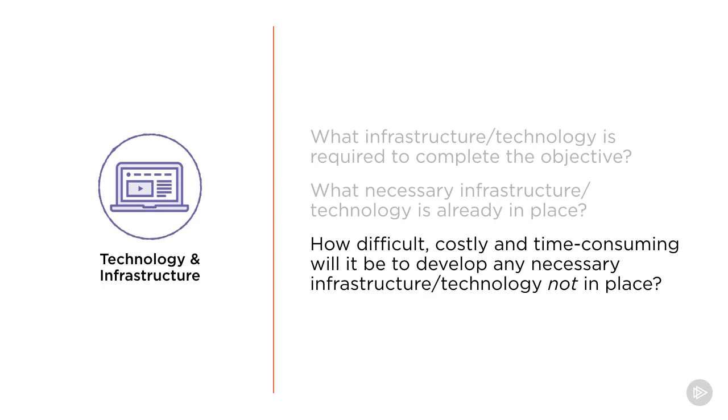not already in place. It could be that we have the ability to complete an objective if we completely overhaul our internal infrastructure, but the support to do so is simply not there. The amount of time it will take to complete that overhaul means that we'll likely miss the opportunity that we're trying to chase, and the amount of value that we create would be less than the cost that it would take in order to complete all of this new overhaul of our infrastructure. And as such, perhaps it's not a very good objective after all.